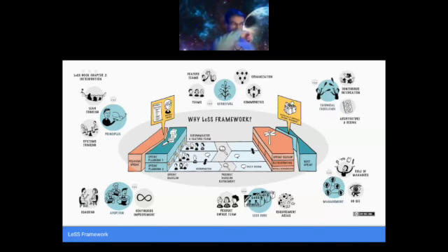Followed by that, each self-managing team will work on their features and collaborate with the other teams whenever needed. Then about halfway through, each sprint team takes a break from their features to refine the backlog during product backlog refinement. This is done with the end customers and is helpful to make sure that what we are developing is something that the customer actually wants.